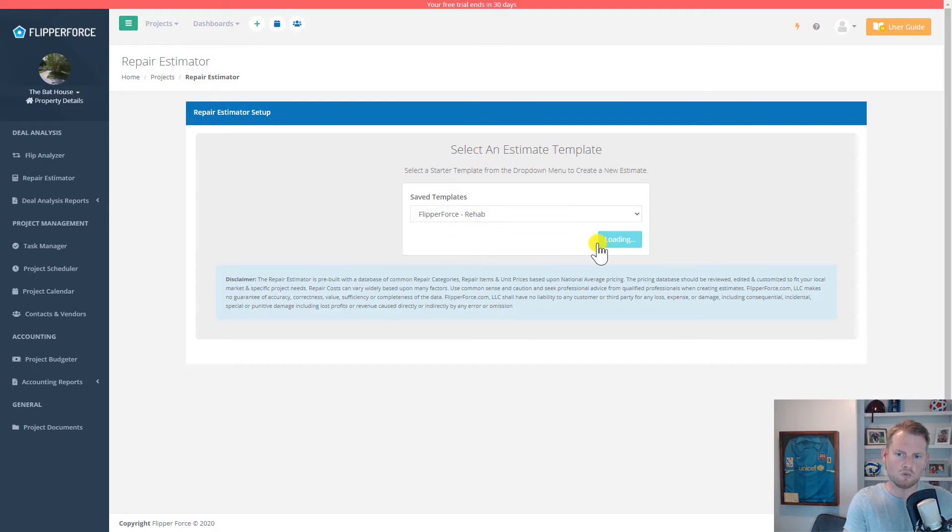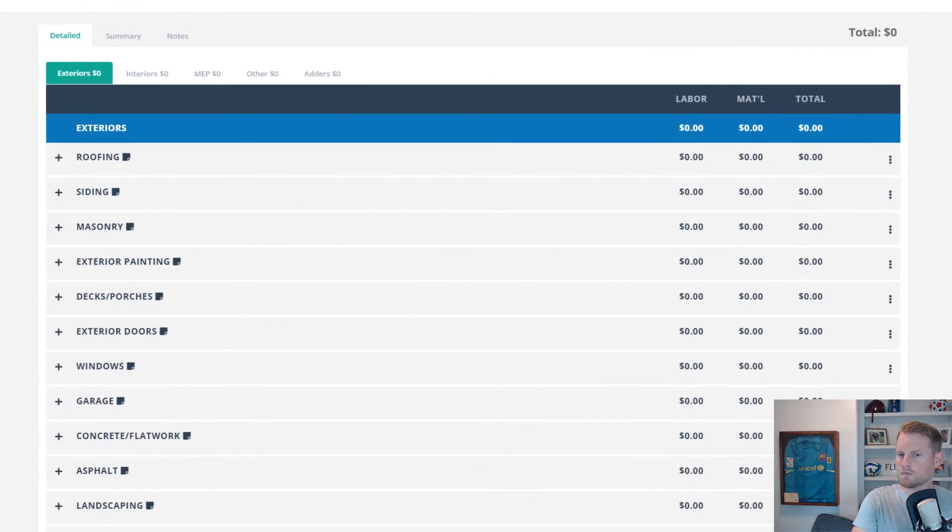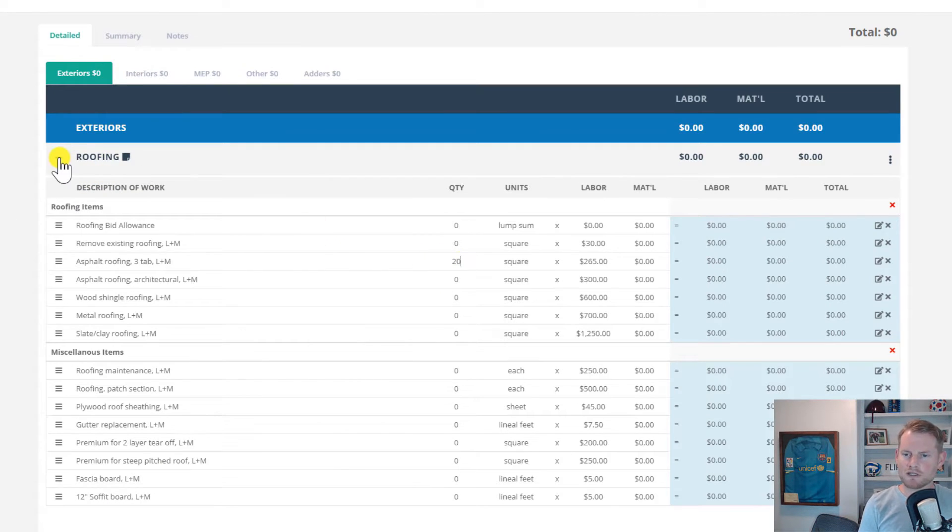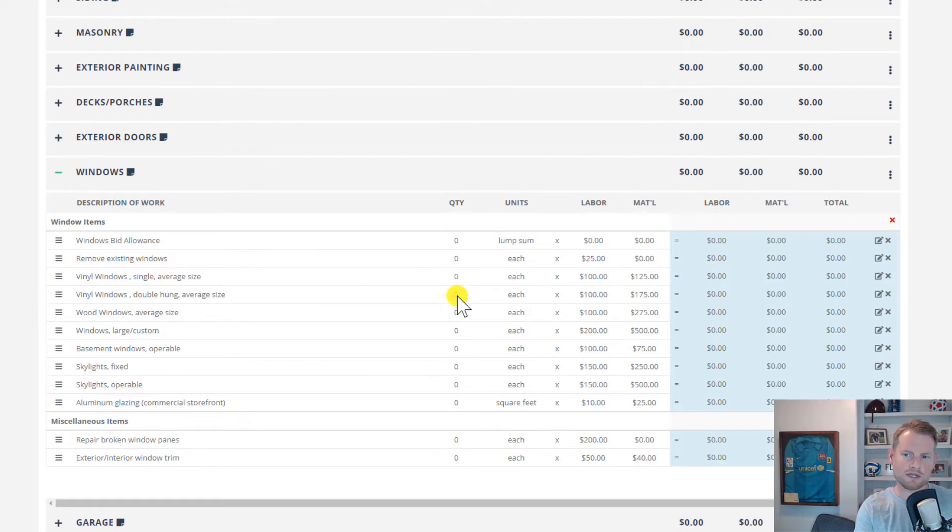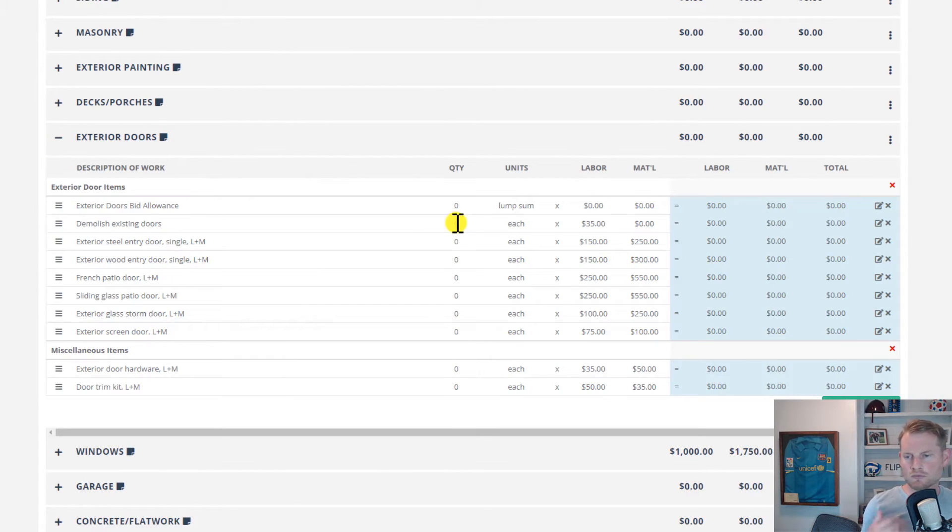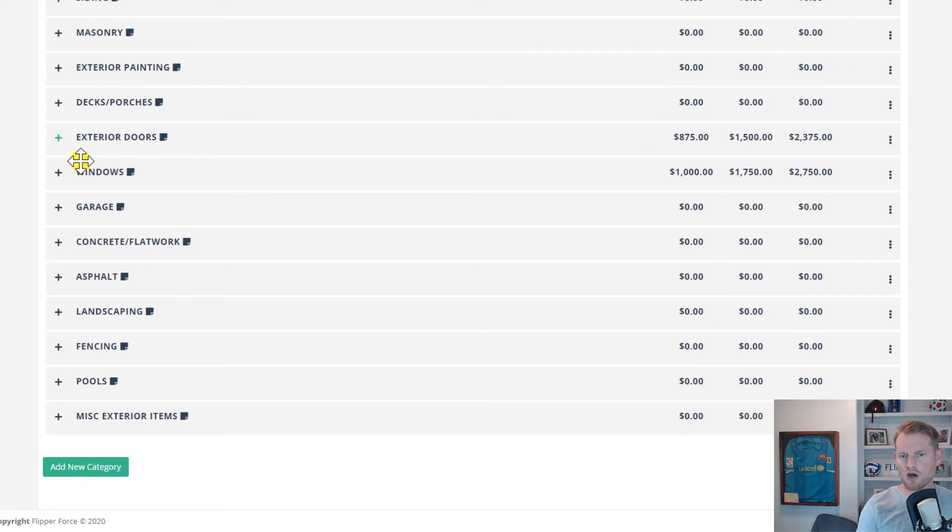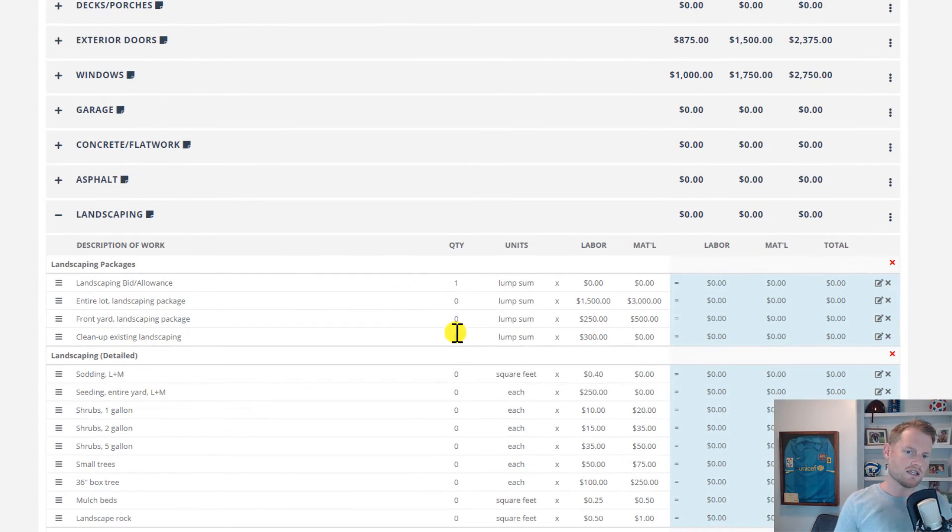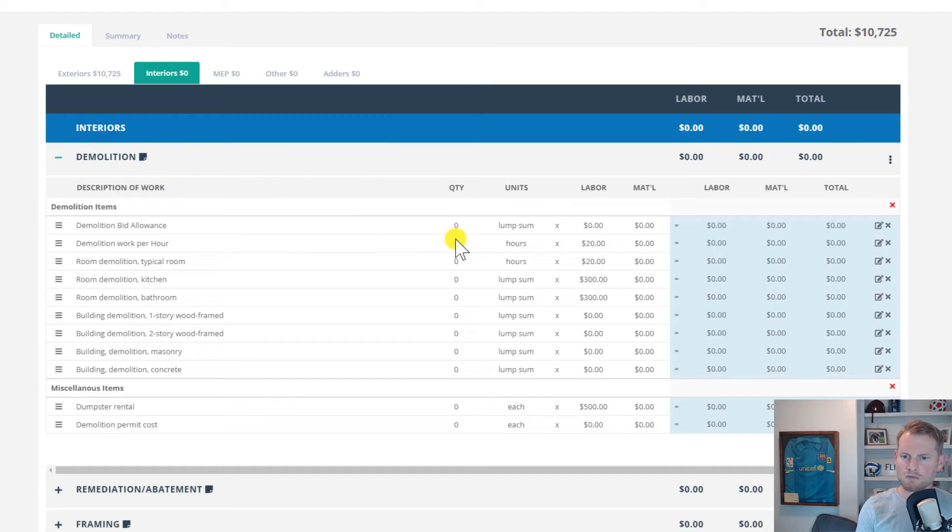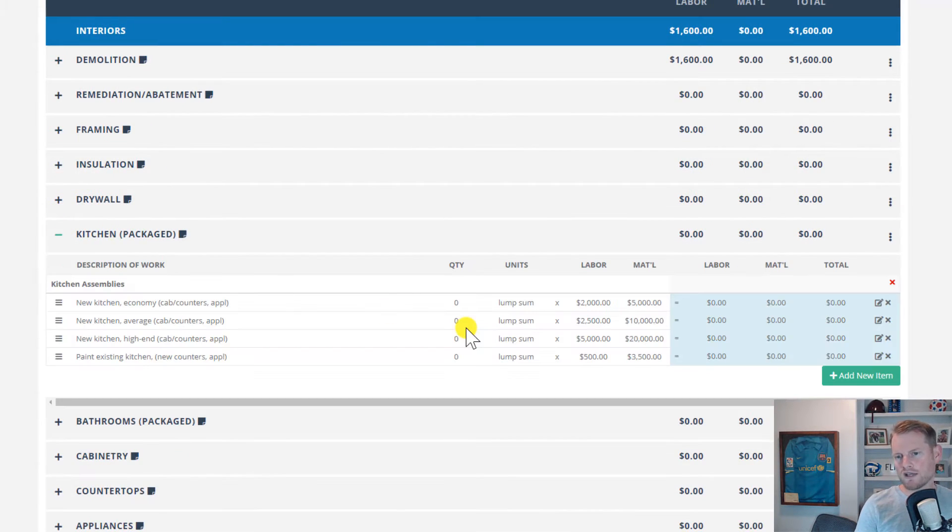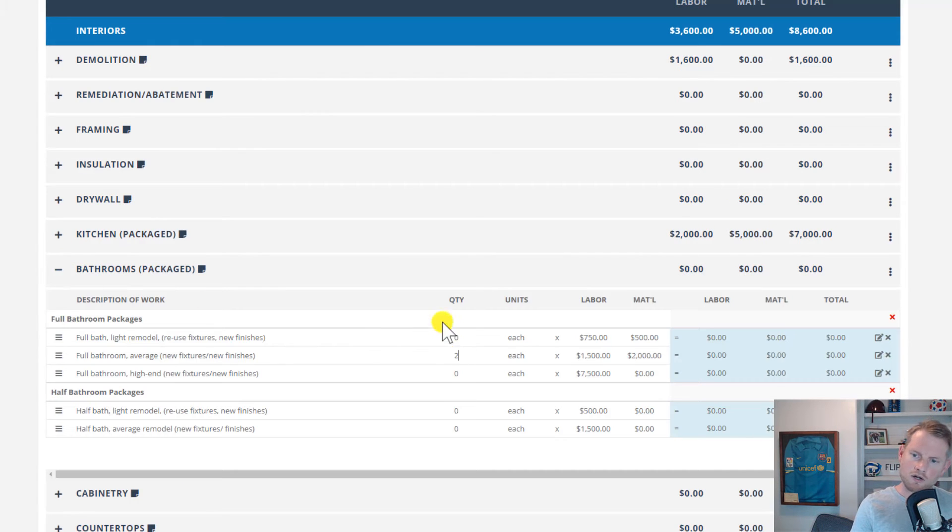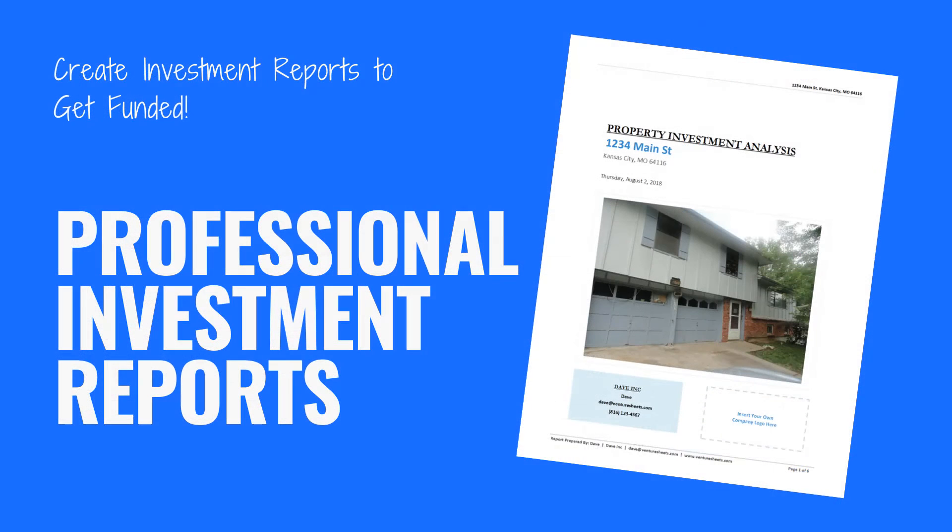Once you get that template loaded, input your quantities. Quantify all of the different repairs that need to happen on the property, input those quantities into the estimator, and then adjust the pricing to fit your specific project market and the materials that you're going to be using on your project. Again, we do have multiple case studies for estimating rehab costs that you can find in our user guide in the upper right hand corner or on our website or our YouTube channel.